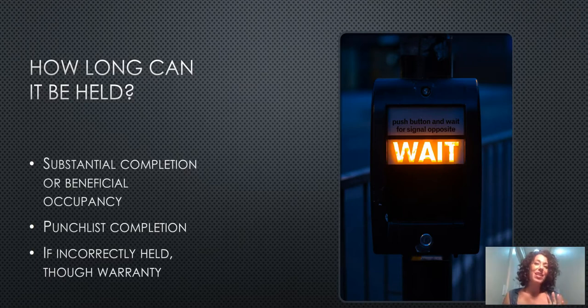So how long is it supposed to be held and how long it is actually held could be different. How long it is supposed to be held, at least for most states, is until substantial completion or until beneficial occupancy. And what that means on substantial completion, most states define it as 98% complete. I can tell you I don't see that very often. I see more of the beneficial occupancy.